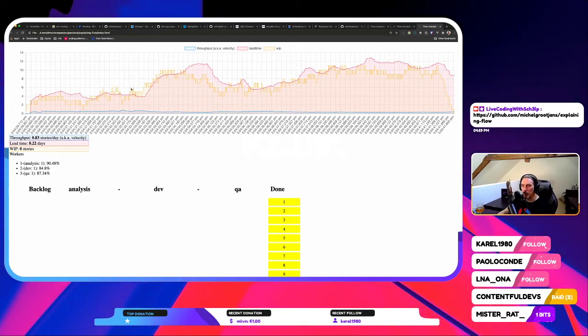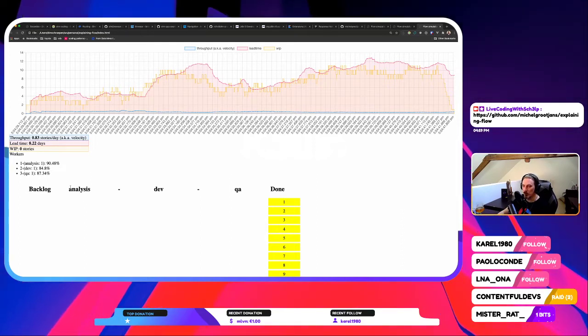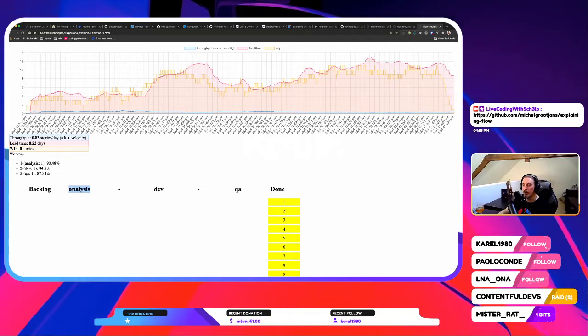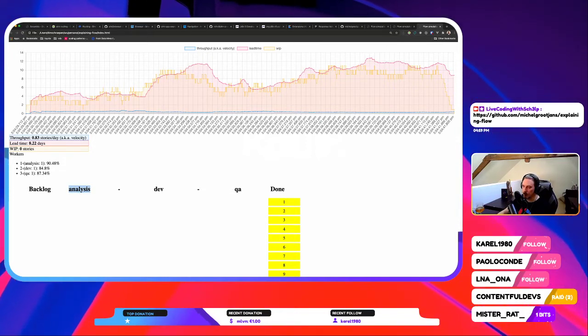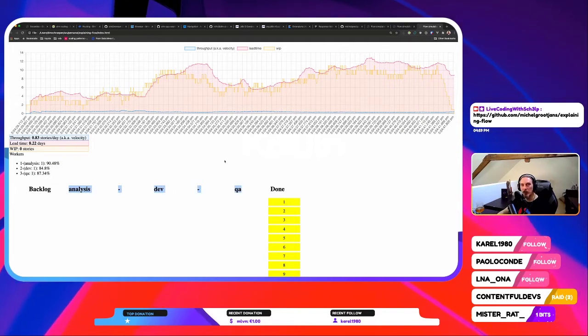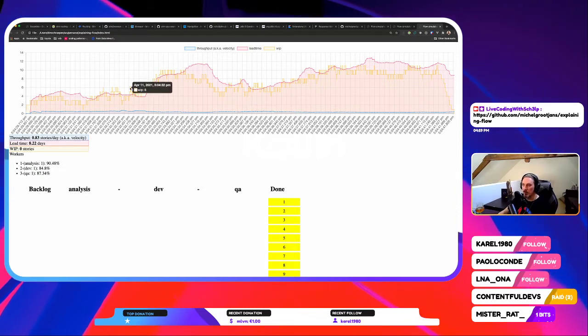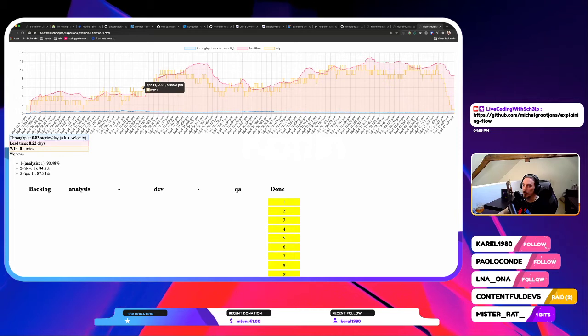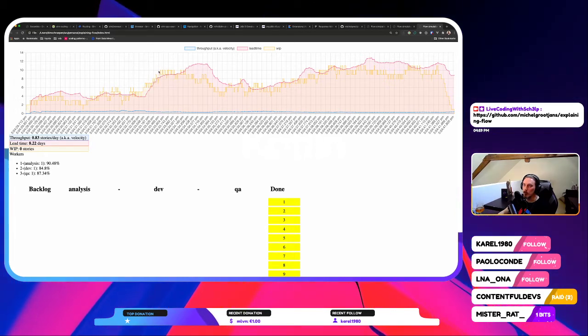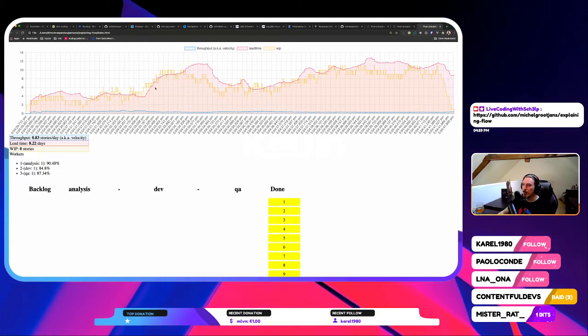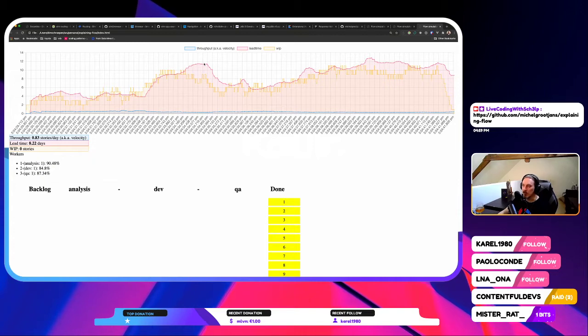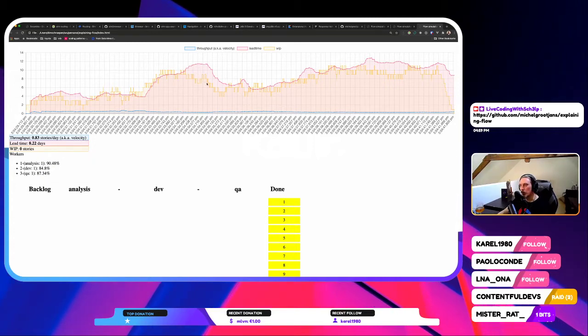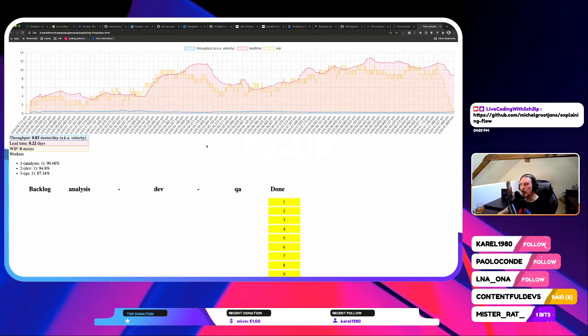So here, if we've got some work in progress at 6, that means across the entire board. Starting from when people in the team pick up an item out of the backlog, the moment they do that, we'll start counting it as work in progress. Until it hits done, it's still work in progress because it's not being delivered, right? So the moment this work in progress increases, you'll see that it will increase from 6 to 7 and then eventually to 12 or 10 here. After that, the lead time also steadily increases. And likewise, when your work in progress drops, the lead time will also decrease. So you will be delivering value much faster, right?